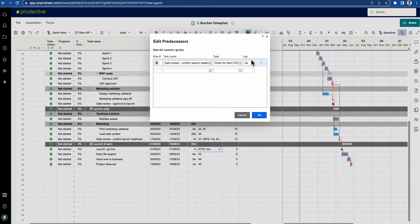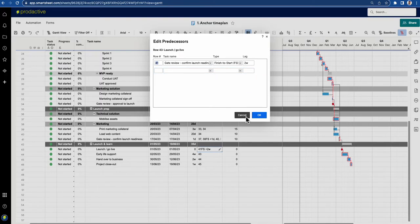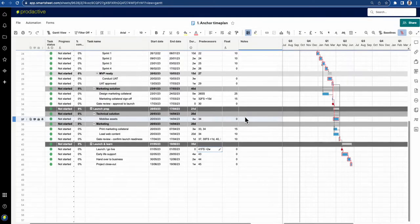The lag can often be for situations like: you're painting a house, you've plastered the walls and have to let it set for a period of time before you can paint. So you'd insert the task finishing on a given day with a lag for the curing of that plastering.